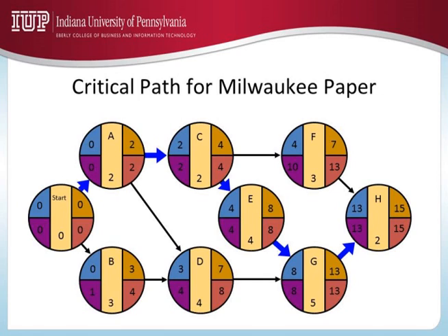So if you're a formula-oriented person, earliest start time is equal to the maximum value of the earliest finish time of the activity's immediate predecessors. So you're taking the maximum value of 7 and 8, you're putting it here. Continuing, G earliest finish will be 8 plus 5, 13.